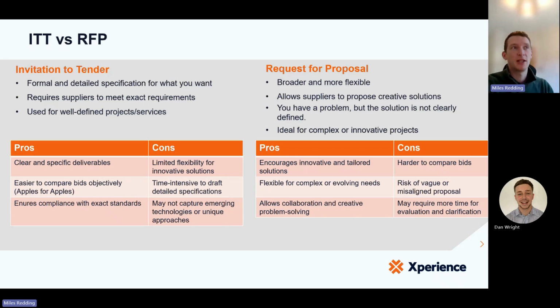In my experience, some of the best RFP processes are actually run almost in partnership with those that are bidding. They'll come to site, they'll do their due diligence, they'll have a bit of a workshop with you on site. And certainly the good bidders will invest that time up front to really understand the problems that we're trying to address. But once again, the downside of that, it requires far more time and resource to run that process and far more time for evaluation and clarification throughout that.